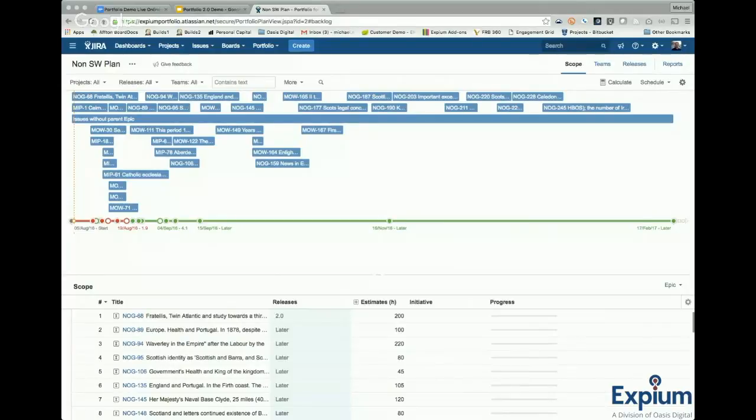and you can take a look and you can just generally see, okay, you can look at it from one perspective is, how much work do we have for our teams? What's the backlog look like? Am I running out of work for my guys in 3 months? And if so, do I need to think about getting more work for my guys, defining more work, or do I need to slim down the team?